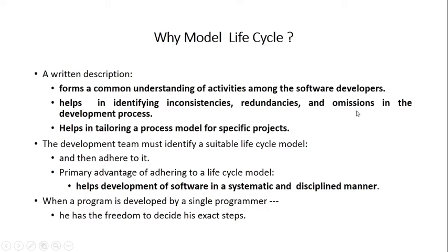Omissions: have we left something out, or have we actually identified all the requirements and mentioned them here and nothing else is left? That would be 100% perfect, but it's an ideal case that never happens. We have seen in practice that requirements get frozen. We are not able to identify some requirements, but later as we move towards designing and coding, when the visibility and understandability of the software increases, then we realize some more requirements must be there. Then we have to go back and rework everything.